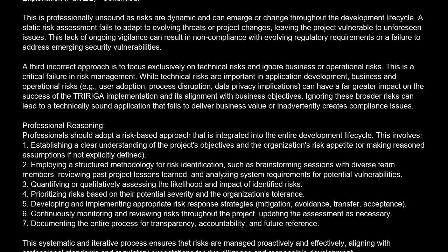3. Quantifying or qualitatively assessing the likelihood and impact of identified risks. 4. Prioritizing risks based on their potential severity and the organization's tolerance. 5. Developing and implementing appropriate risk response strategies: mitigation, avoidance, transfer, acceptance. 6. Continuously monitoring and reviewing risks throughout the project, updating the assessment as necessary. 7. Documenting the entire process for transparency, accountability, and future reference. This systematic and iterative process ensures that risks are managed proactively and effectively, aligning with professional standards and regulatory expectations for due diligence and responsible development.